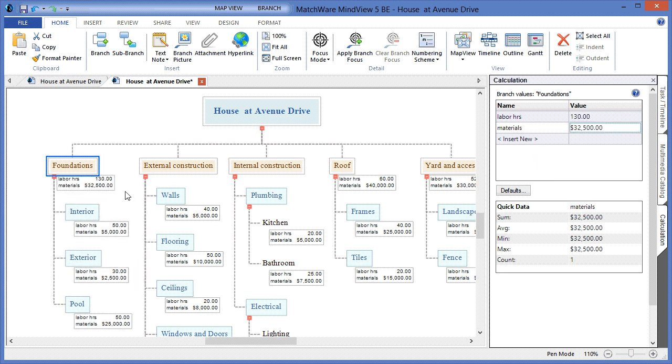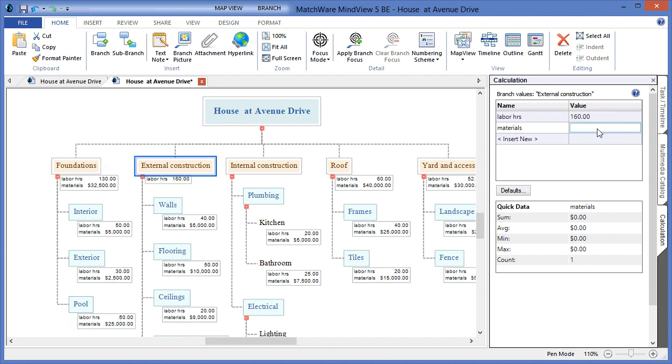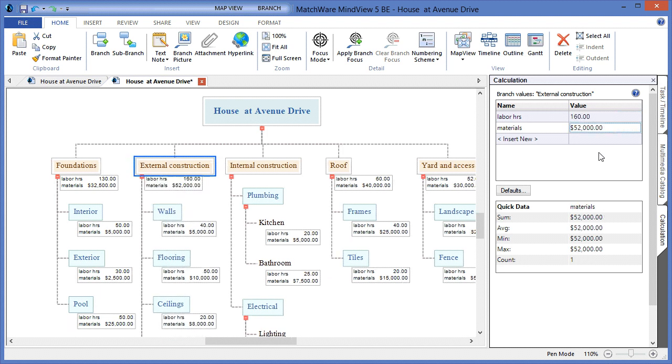As you can see, we get a running total of the labor hours and materials for the corresponding task items. To overview that feature again, I simply choose the deliverable, choose the desired name and value. In the field, I select the Sum branch, and I pull that information in to get a running total on each deliverable level.